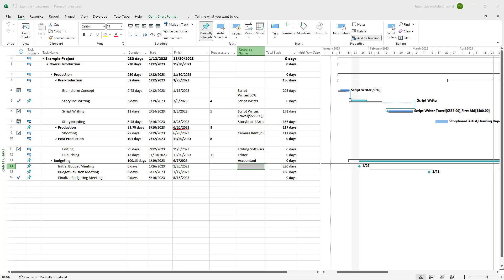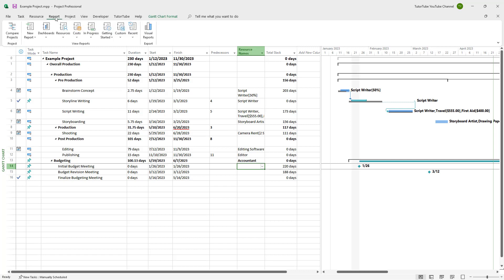What you can do is easily view that on the report tab. You need to go to your report tab, then under dashboards you can see there's cost overview as an option.